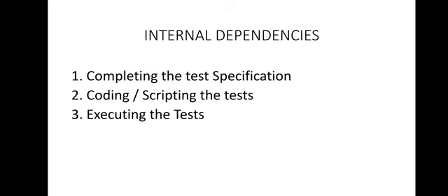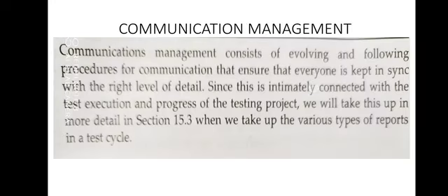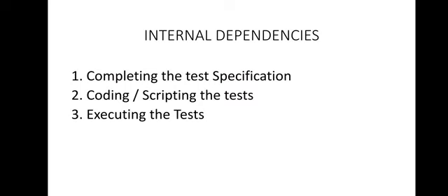Students, the testing activities will also face parallelism constraints that will further restrict the activities that can be done at a time. Let's say we are taking an example that certain tests cannot be run together because there is a conflict. That means we are running some tests, but there is a conflict between some tests. So in these conditions, I will explain by one example: requiring different versions of a component for testing.